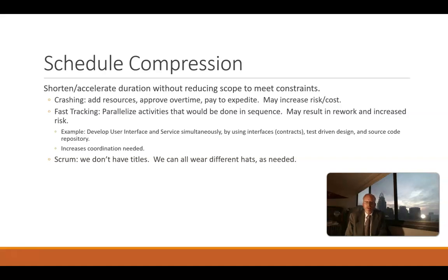So first of all, we can crash a project, which is add resources, approve overtime, and pay to expedite. That can increase risk and cost. Overtime actually used to be kind of a given that, all right, if you're falling behind, you're going to need to work extra hours to make it up. I will say in the days of Scrum, emphasis has gone off of overtime,